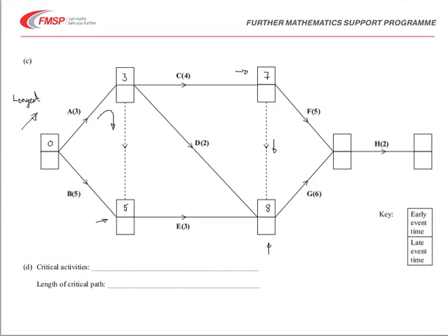You can see that no, that 7 is smaller than 8. So you have to be careful, particularly when you've got these dummy activities lying around, that you do look for the longest path. So checking the next one, we've got 8 plus 6 is 14, or 7 plus 5, well, that's 12, so the largest one is 14. And finally the 14 plus 2 giving you 16.